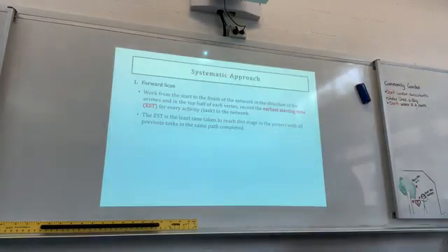Now, systematic approach. You must work from the start to the finish in the direction of the arrows and in the top half of each vertex. Record the earliest start time, EST, for every activity or every task in the network. The earliest start time is the least time taken to reach this stage in the project, with all previous tasks in the same path completed. Sounds a bit mumble jumble, but I'll show you what to do.